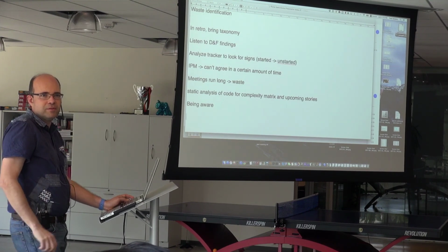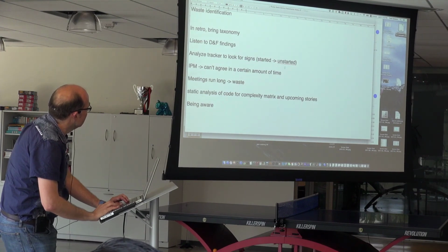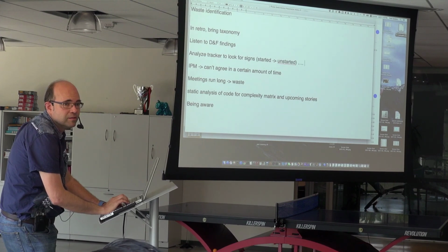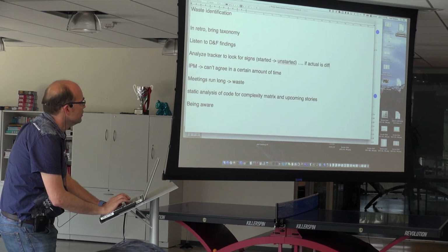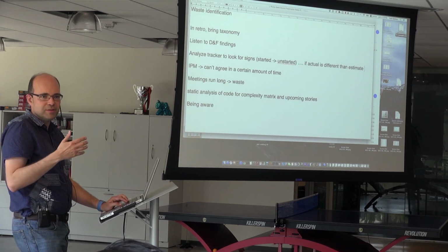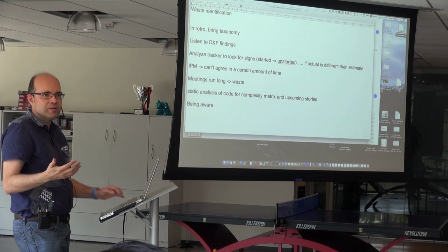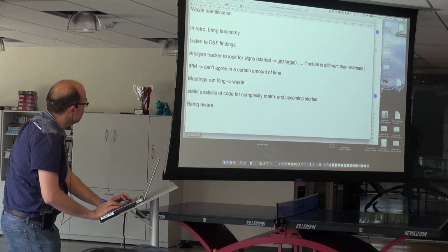I saw one more hand over here about identify. It's kind of to what Ross said. If you have lots of stories that take way longer than you expect, you point them at a certain amount. Basically, your pointed story is bifurcated. You have one pointers, two pointers, and you have a bunch of them that take way longer. And that's conflating pointing with time. Sure, complexity versus time. So there may be something in there. There are hazards with using story points, but if we could track actual points versus estimated points, one could identify the stories where we're maybe not estimating well and figure out what was going on with that.